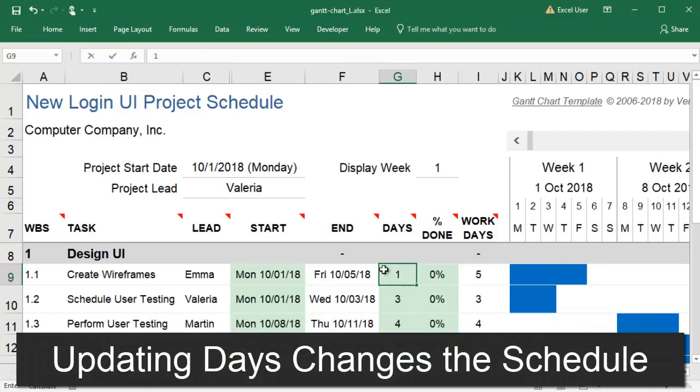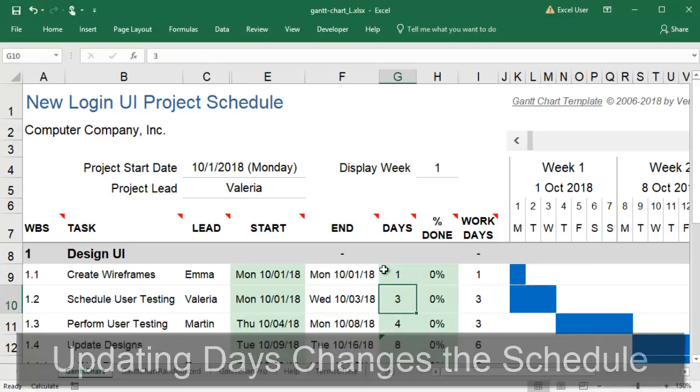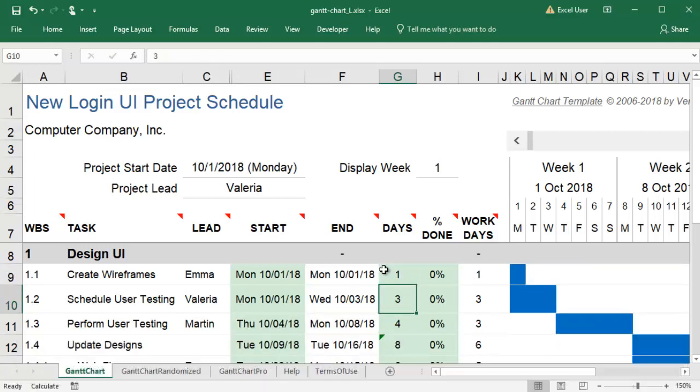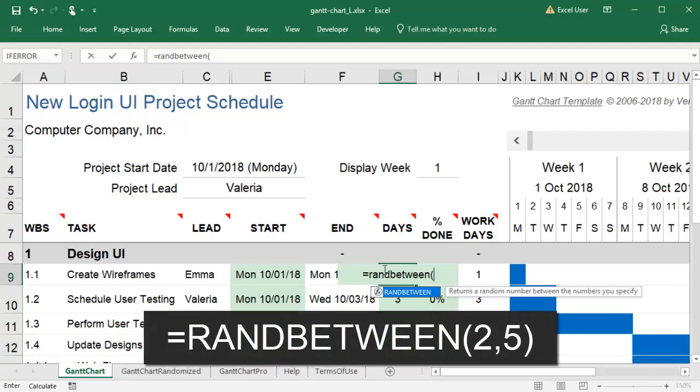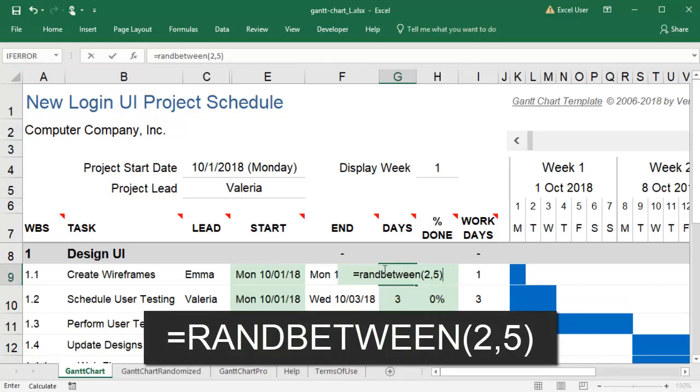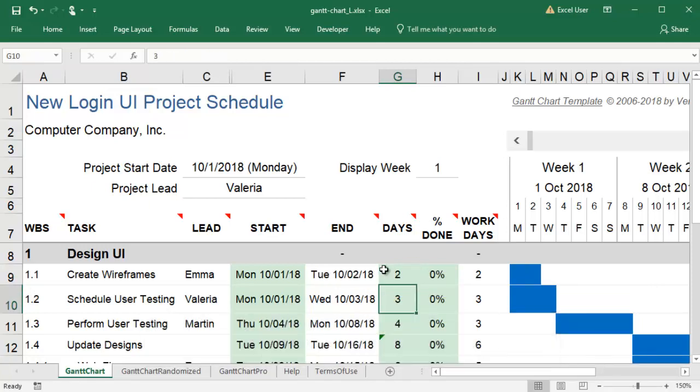I'd like my Gantt chart worksheet to reflect the uncertainty in my timelines. So instead of recording that a task will take three days, I will use the Rand Between formula to show it will take somewhere between two and five days.